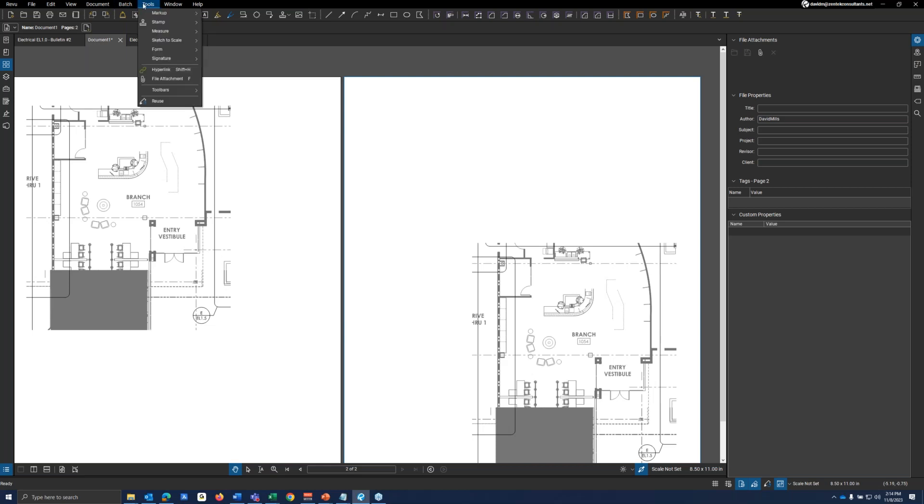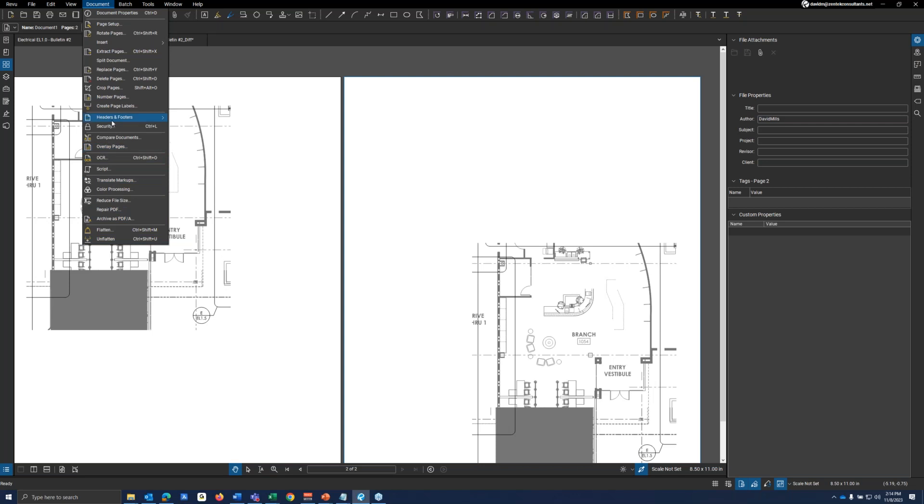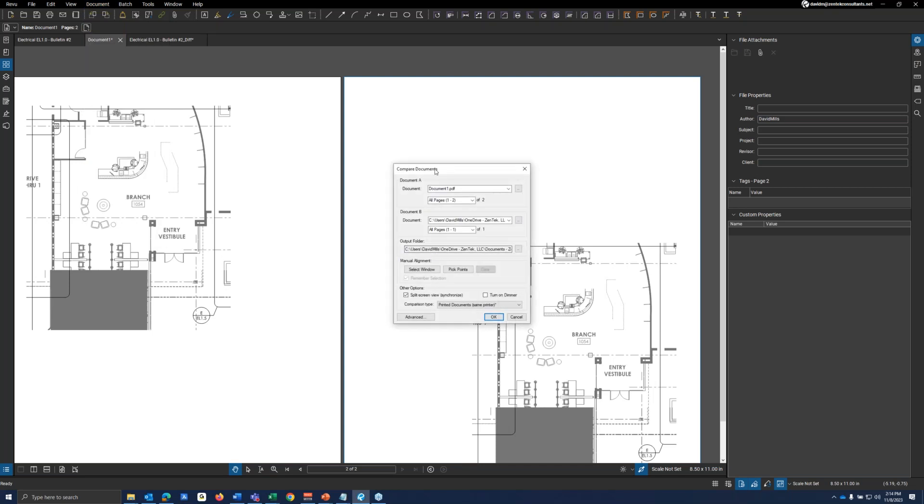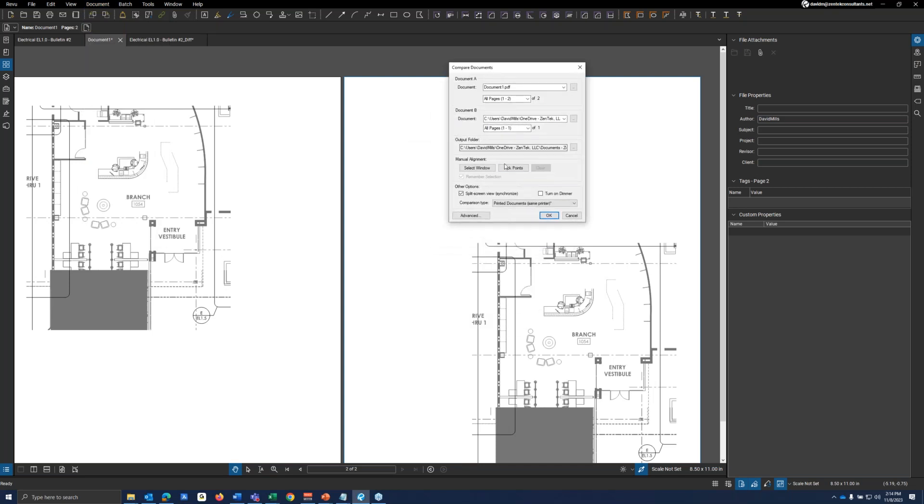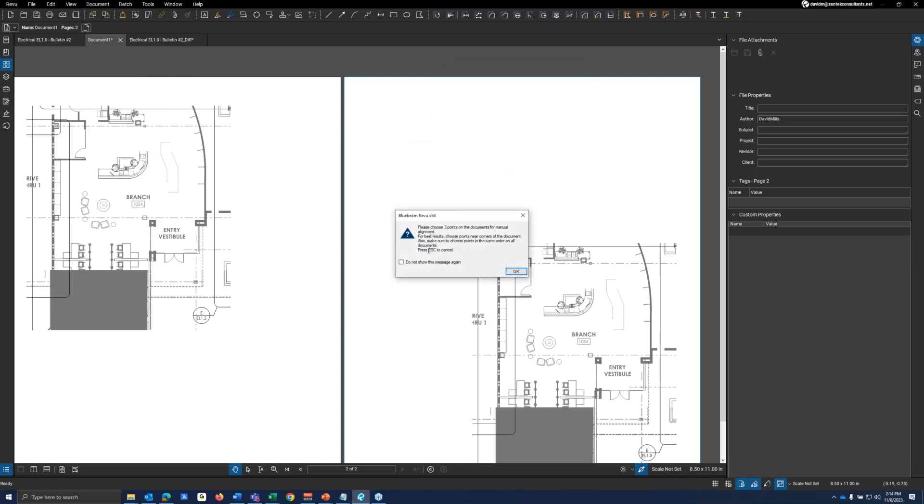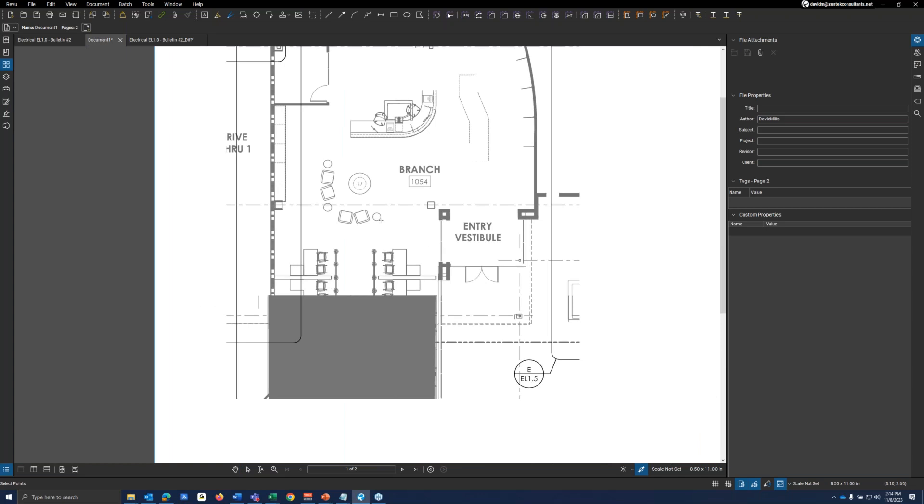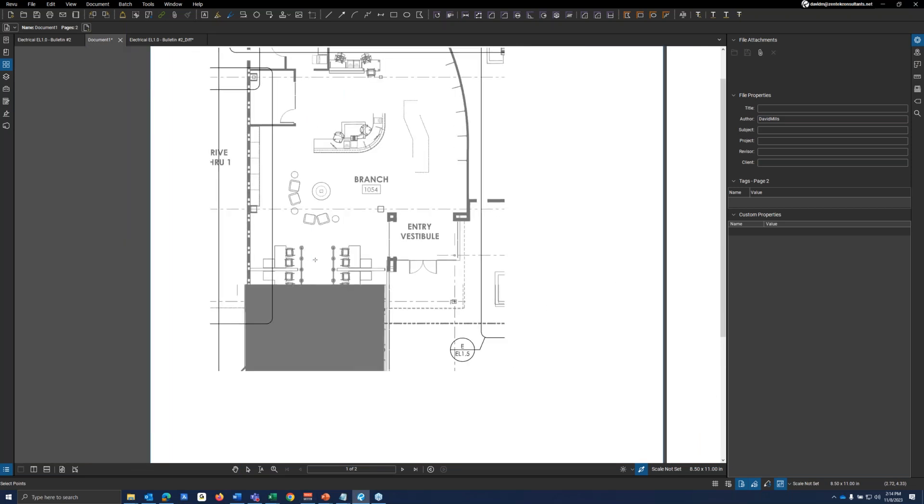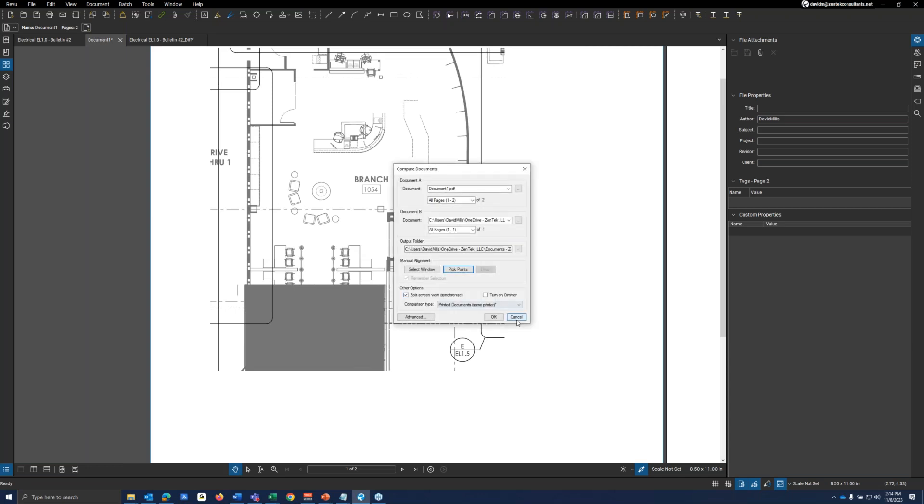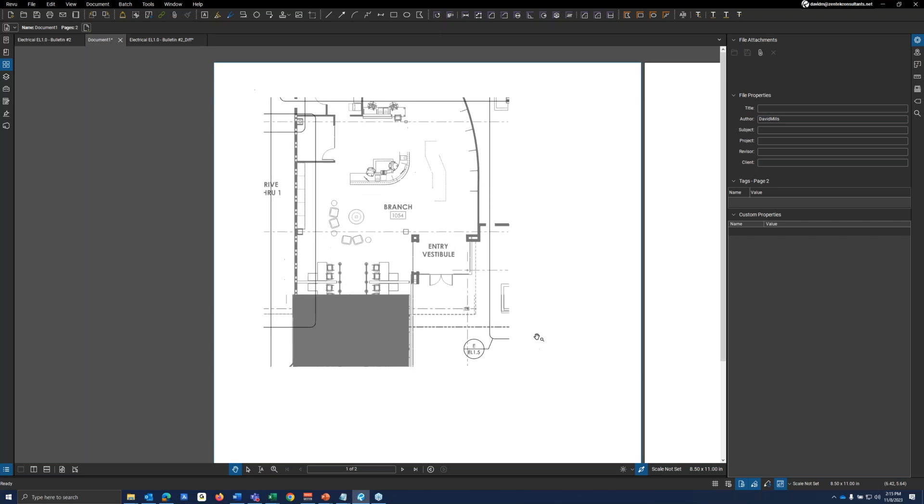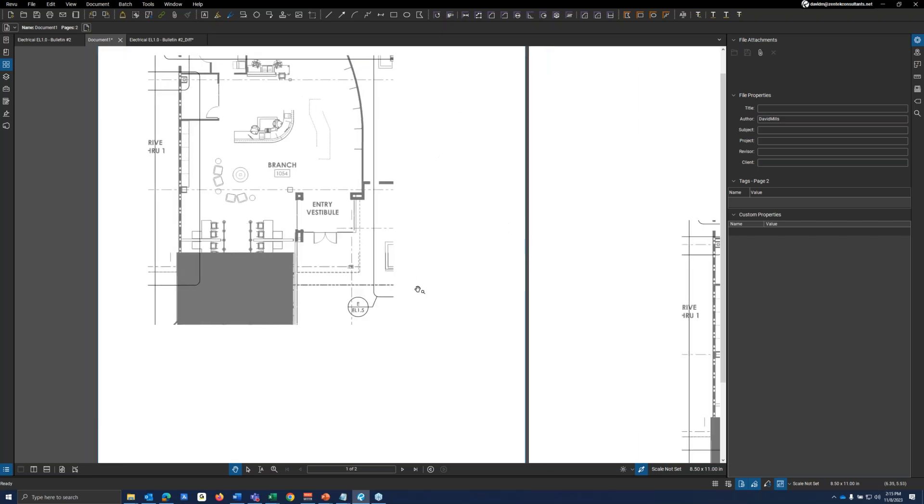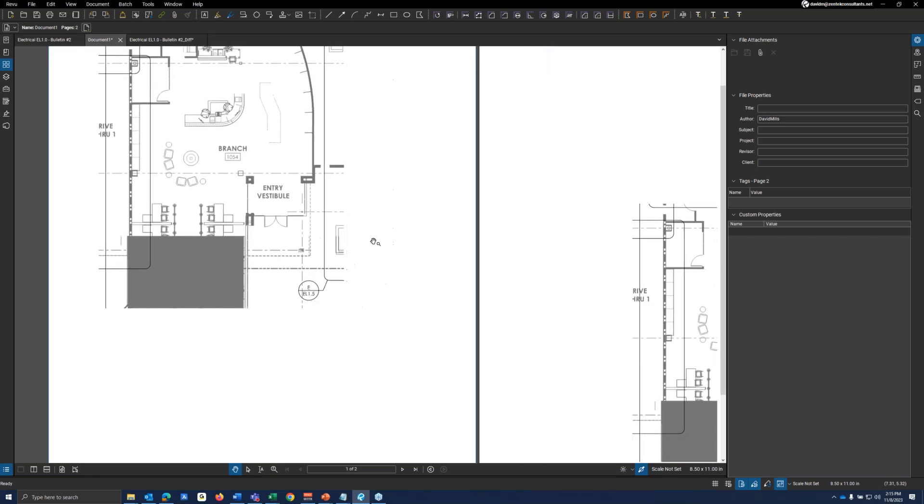So that's when you actually get into the pick points feature. Let me see if I, where is that here? Compare documents. And it'll tell you, hey, you're going to want to choose three different points. Now, I would highly recommend looking at column lines. If you're doing a drawing, column lines are typically your best bet to do so. Mainly because they're in the same spot. They don't change on a building per se, or at least they shouldn't. If you're doing a major revision. If column lines do change, try to find something that is the same between those two drawings.